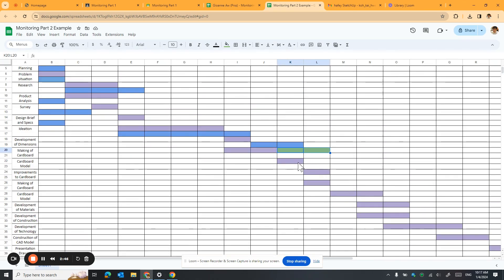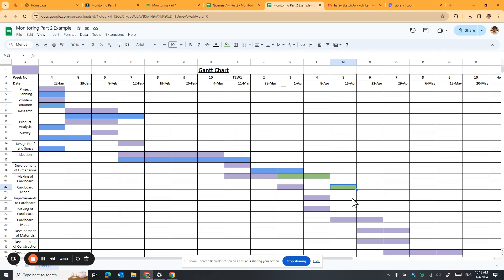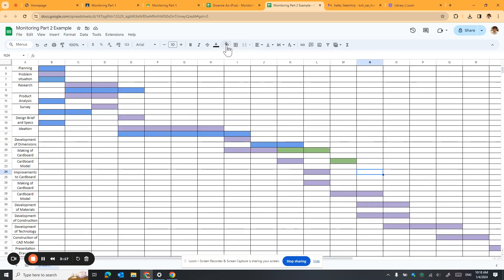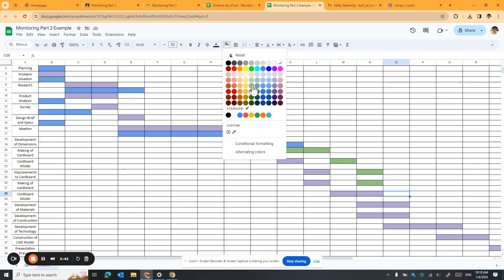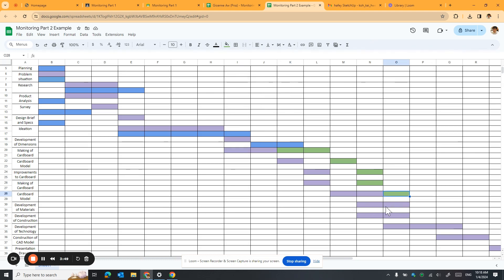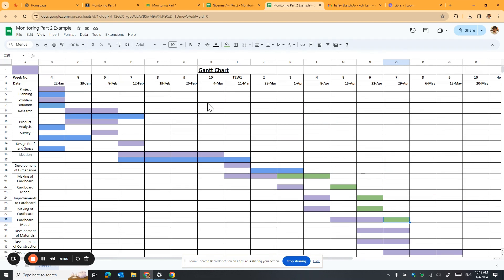This is my revised plan — another two weeks in the same green color. If I finish by 8th of April, I must do my cover model evaluation after that, so I'll do it this week. For improvement, I'll do it by the 22nd of April week, and making of cover model 2 also the same week. Development of materials I'll also do by the same week, so I need to speed up in order to finish the project on time.